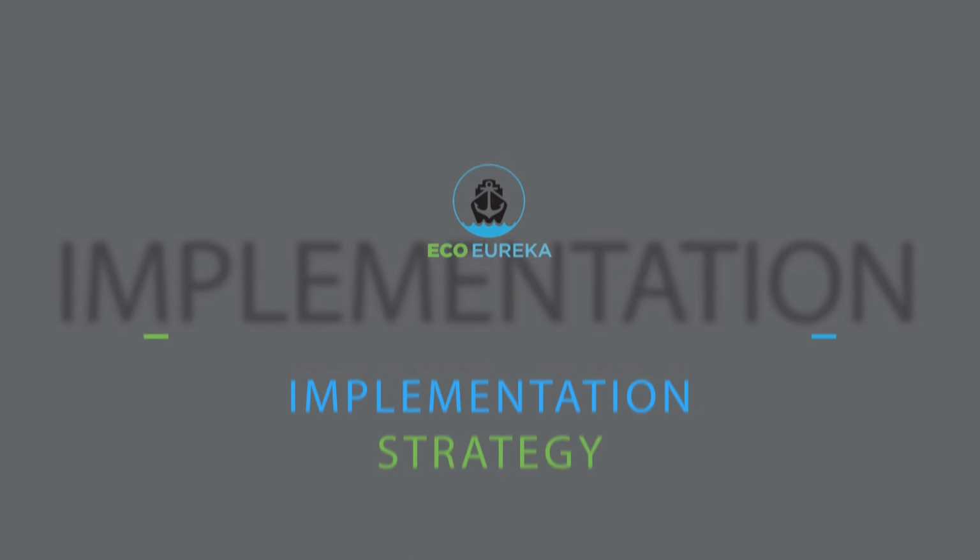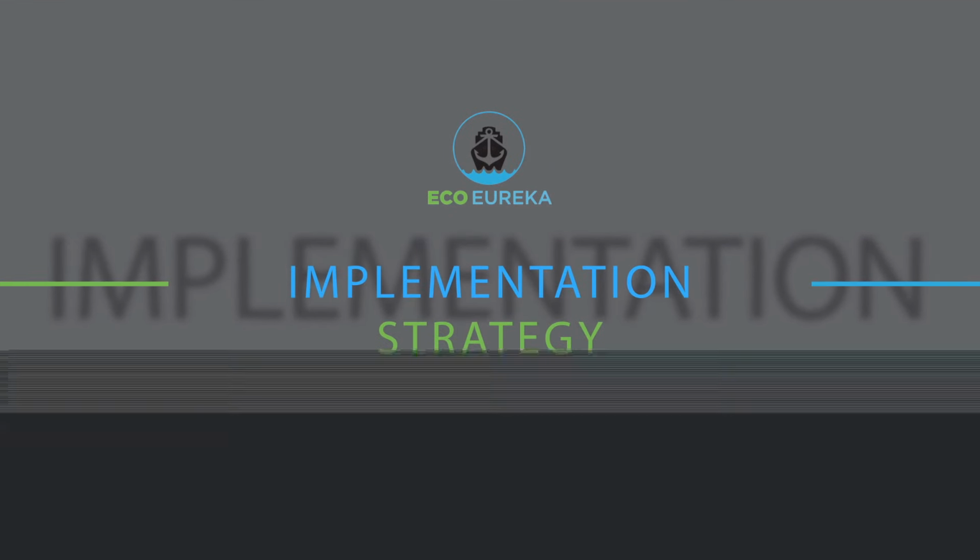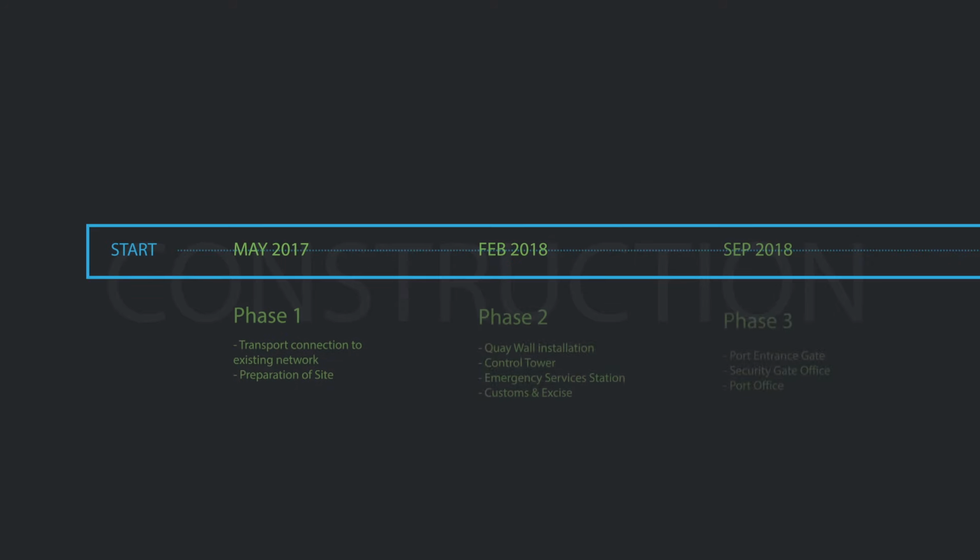We will now present to you the implementation strategy. In May 2017, Phase 1 of construction is focused on connecting the existing transport network to the site whilst preparing the site for further construction work. Phase 2, beginning in February 2018, will see the key wall installation along with the construction of high priority large buildings. The port gates will be built in Phase 3, due to start in September 2018.